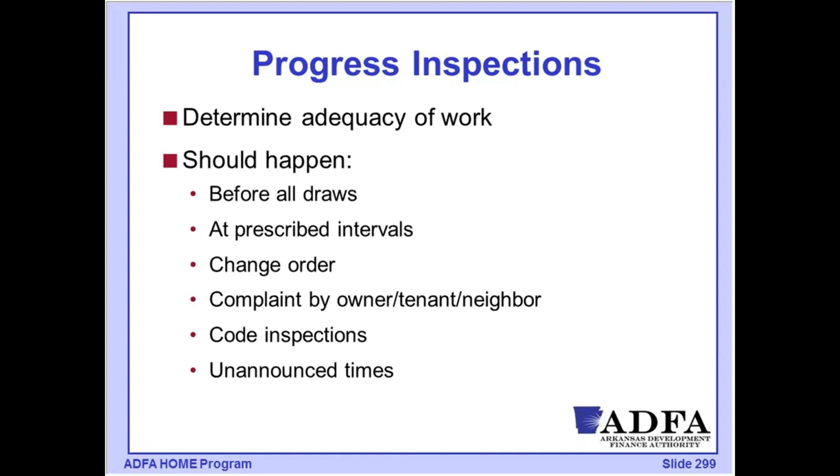Also, if there's going to be a request for a change order, there needs to be an inspection done to verify the reason for this change order, that you agree with it, that the proposed change to the scope of work is going to be appropriate.